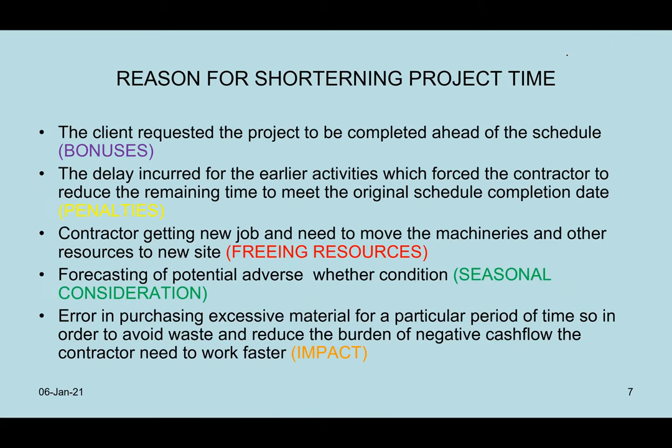Okay, now, reasons for shortening. Why do we basically want to shorten the project time or duration? Perhaps the first reason is client request. The client asks the contractor, can you reduce the project duration instead of 2 years? How many months can you reduce? Perhaps 3 months, 6 months. If you reduce 6 months from 2 years, that would be 1.5 years. Okay? But there is a limit to what you can reduce.